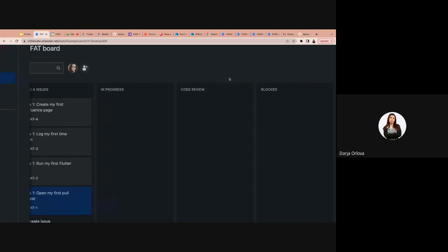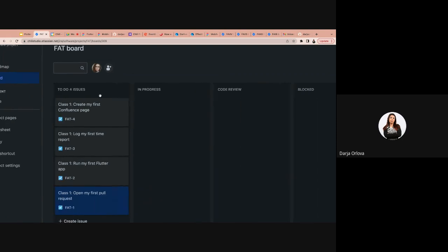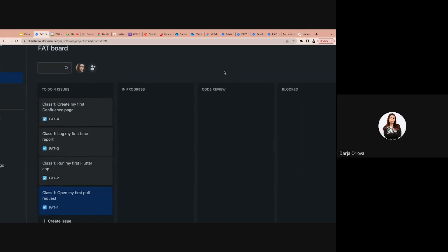So they move on from to test to testing. And if anything is wrong with it, depending on how wrong, for example, if it's a fundamental issue with the whole ticket, then the whole ticket gets moved back to backlog and the developer has to fix it. But if it's in general okay, but there are some minor bugs, for example, colors being 10% different, something like that, then a new ticket is created, and that other one is moved to done, and this bug report is a new task.